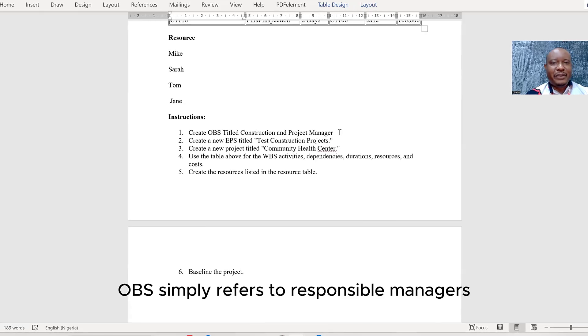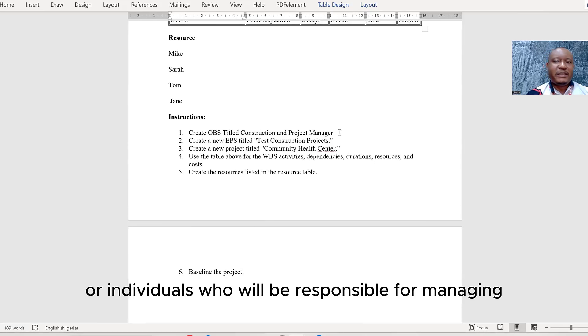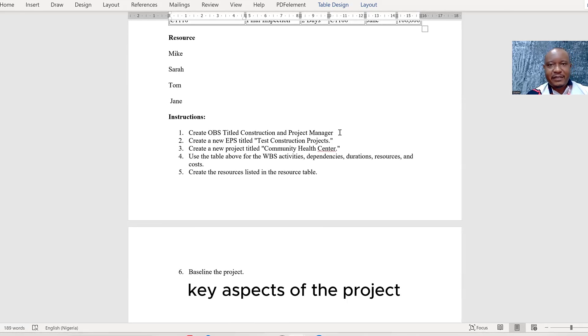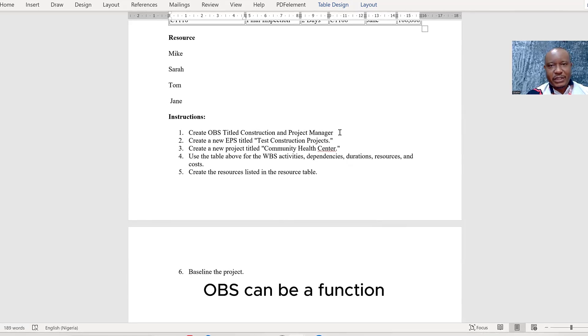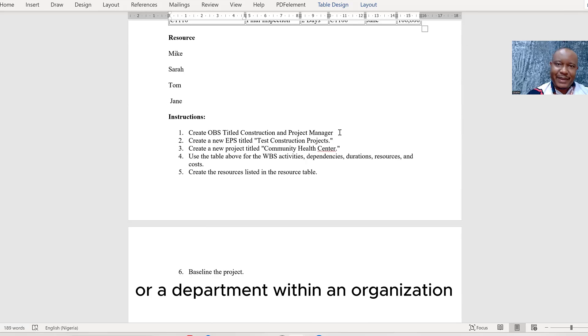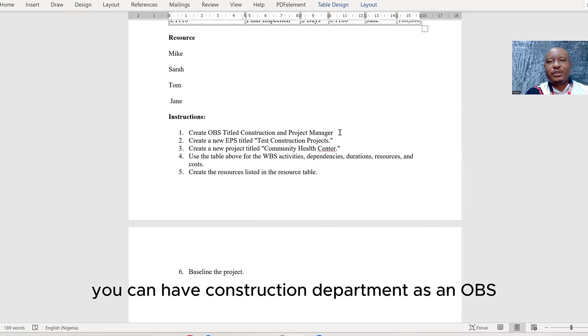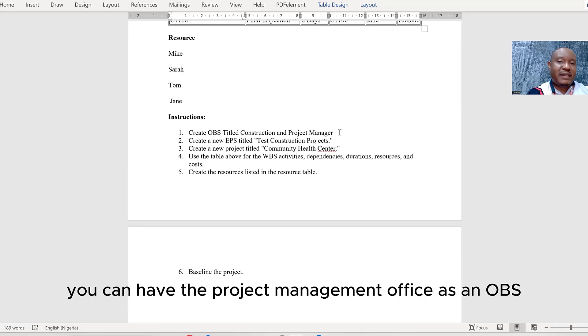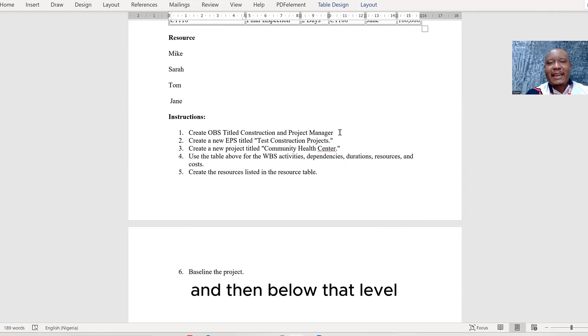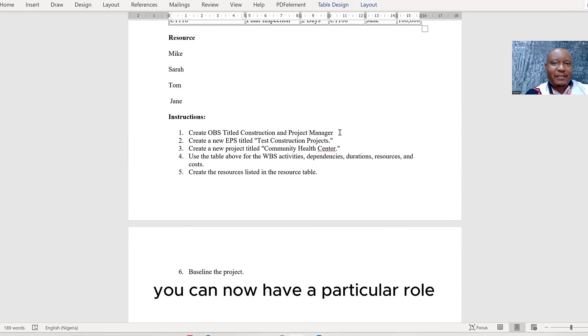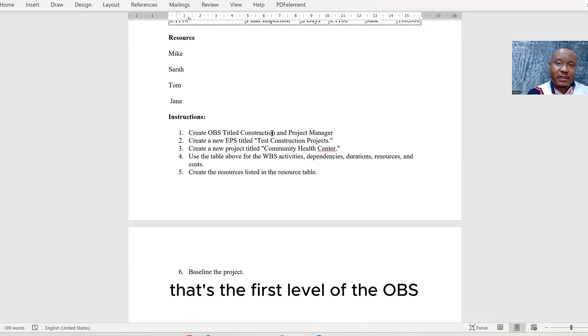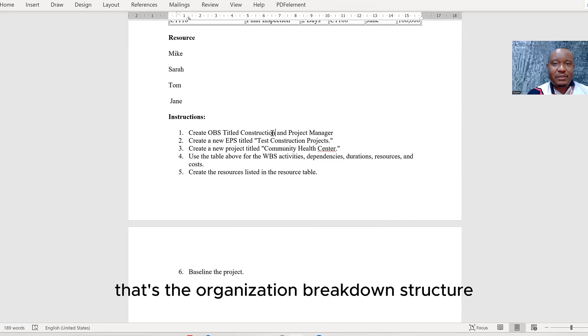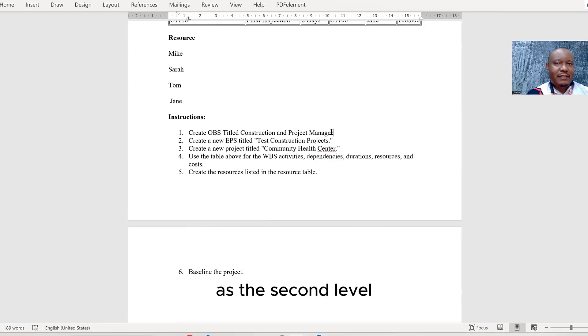OBS simply refers to responsible managers. These are folks or individuals who will be responsible for managing key aspects of the project or the project itself. Aside from that, OBS can be a function or a department within an organization. So for example, you can have a project department as an OBS, a construction department as an OBS, or the project management office as an OBS. Usually the first level is like the department, and then below that level, you can now have a particular role, which is what you have here. So we have construction as a department, that's the first level of the OBS, the organization breakdown structure. And then you now have the project manager here as the second level, and that's exactly what we're going to be creating right away.